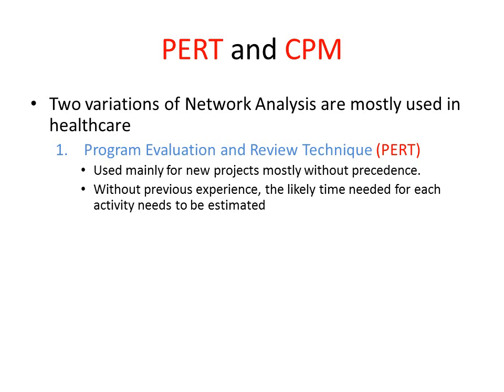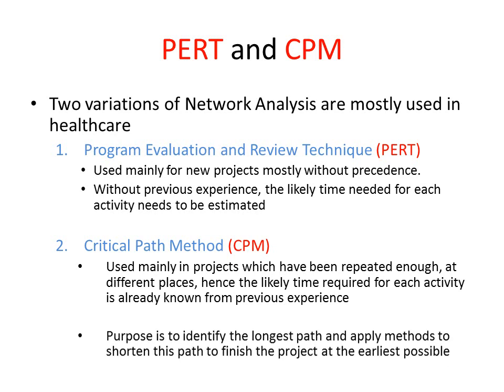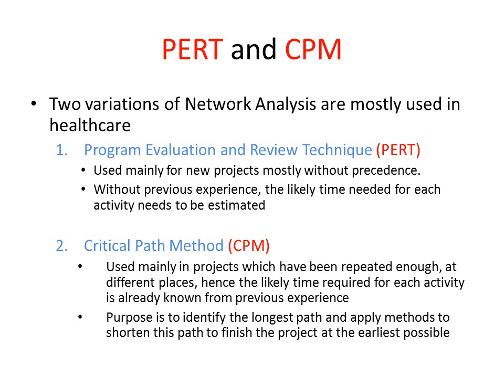Whereas critical path method or CPM is used mainly in projects which have been repeated enough and at many places, and hence the likely time required for each activity is precisely known. The purpose of critical path method is to identify the longest path in the project and apply methods to shorten this path so as to finish the project at the earliest possible time.